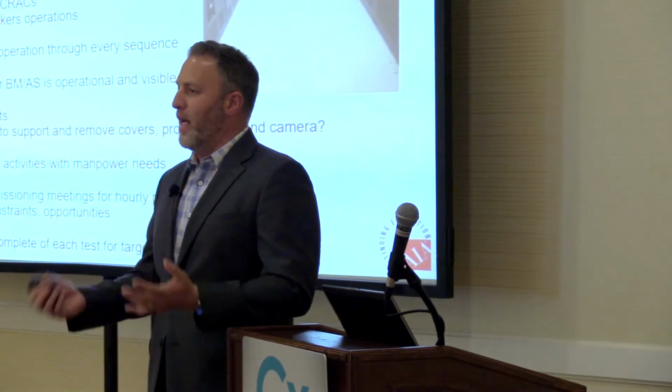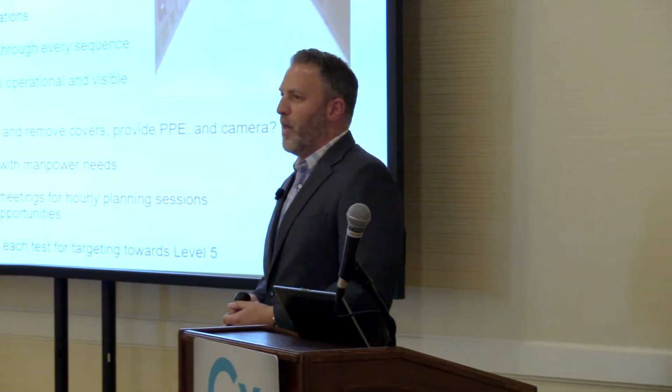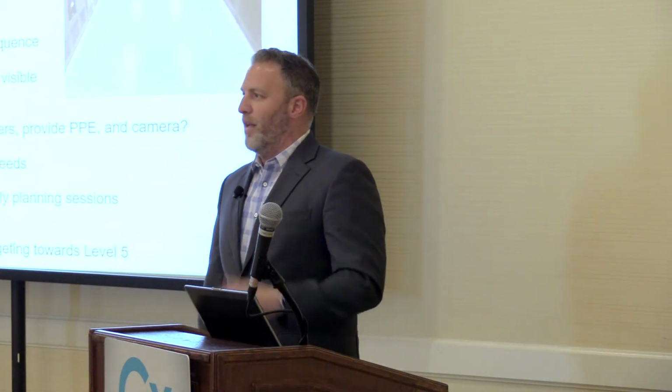Test every point. Go through every operational sequence, just like you normally would on a normal project. Define these in your functional test procedures so that everybody understands your expectation, and then provide your duration to do that functional test. Work with the building management or monitoring contractor so that those points are readily available, so that he's doing trending and can provide you that data.